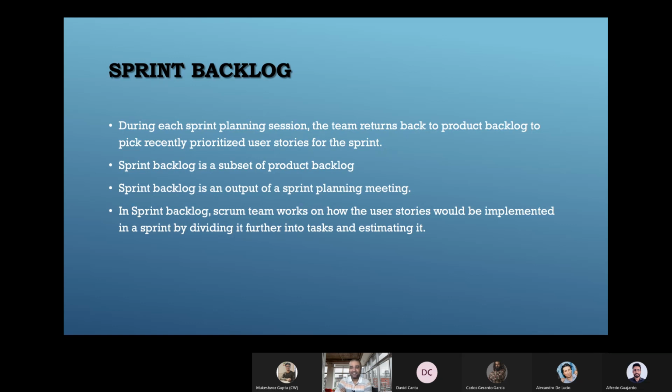We'll say, yes, we are going to deliver some, which means we are not committing to what all we are going to deliver. Are we going to deliver the full thing in a big bang? No. Rather, we are saying that if you want to see some delivery within 1 month or within 15 days, we can do that. And that is possible if you break down epics into stories, and further break down stories into tasks.